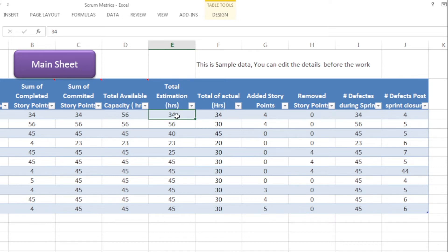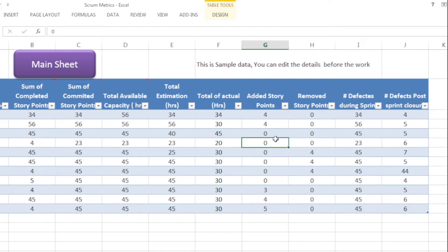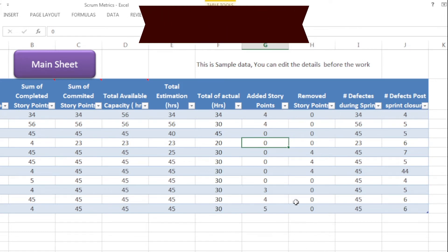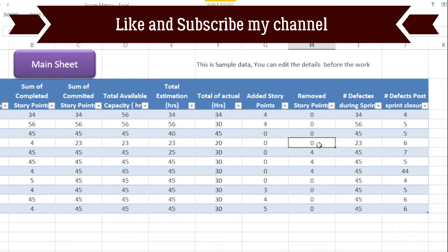Coming back to the data input sheet — in column E you will see total estimation hours. Here you need to feed in the total hours estimated at the beginning of your sprint. The next column shows total actual hours, where you need to complete how many total hours your team has completed by end of the sprint. Now, the next two columns are added story points and removed story points, which are related to scope change — we calculate how many story points were added or removed after the sprint has started.